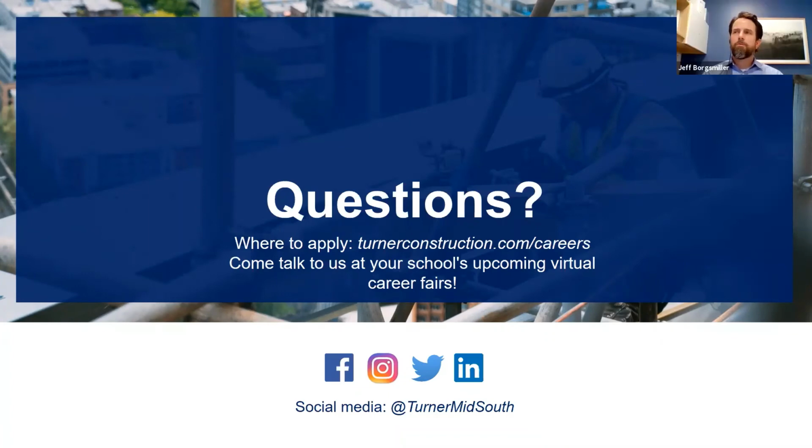Yeah, so we're not really on the front end of R&D for new materials. But we are on the receiving end. We've got suppliers of concrete products, building envelope products, glass products, all kinds of things that are showing up new in the market. And so we're kind of the testers, if you will. We're the first guys to look at it and analyze it in our pre-construction phase and maybe build some mock-ups of it so that we can see what it looks like and how it performs. But we don't have engineers actually doing the R&D development on products. We hire folks that provide products that have R&D folks working for them.